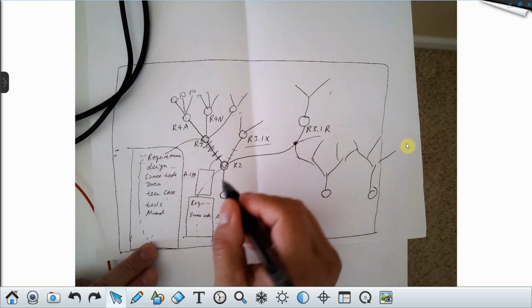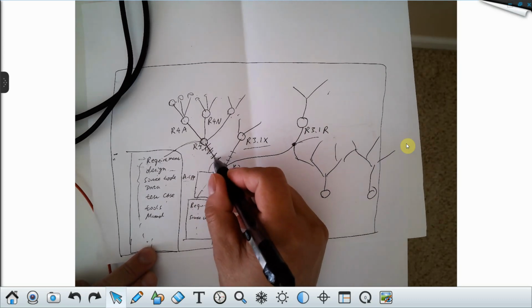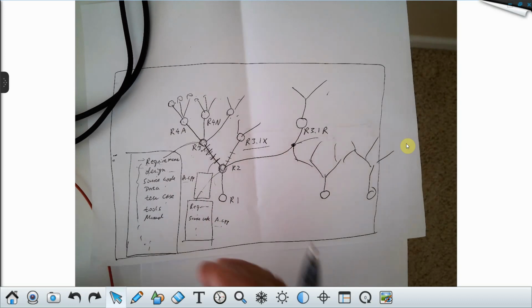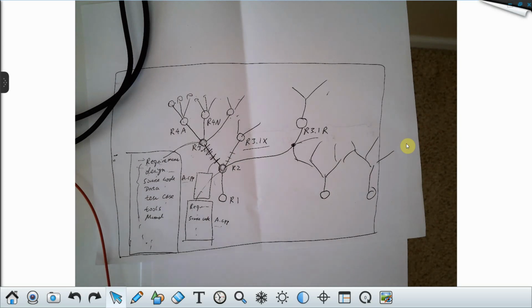But once you go further, between different builds, you define milestones. So each baseline is a baseline and a milestone. The difference between a baseline and a milestone is that a baseline comes after review. You review everything you have done at this point,